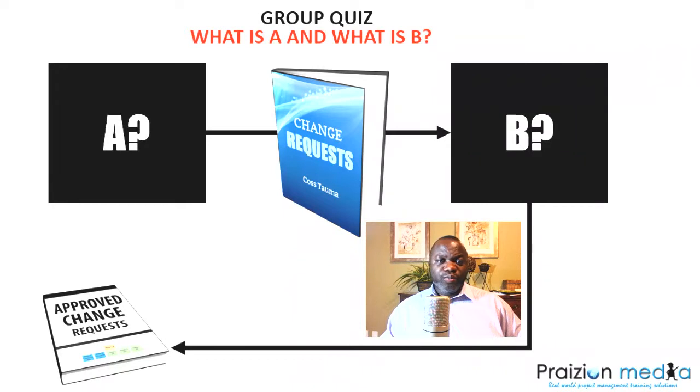With that same thinking, you go into scope. They don't come from any of the planning processes in scope. They come from the controlling processes. So you got validate scope, you got control scope. You see? Then you take that consciousness and you keep moving through the list. Okay, I hope you're ready now. Let's take a look at all of these processes, a boatload of processes.